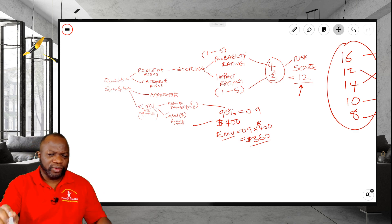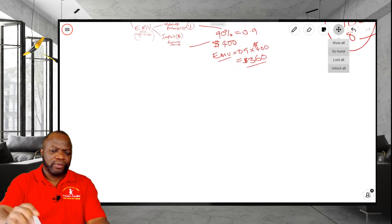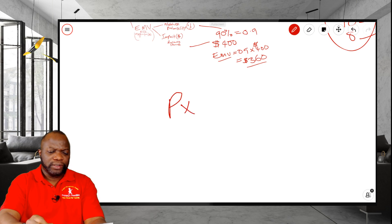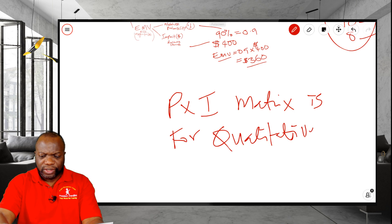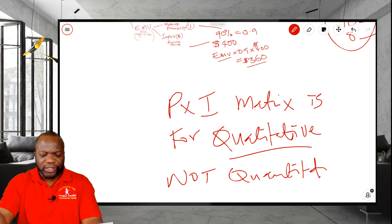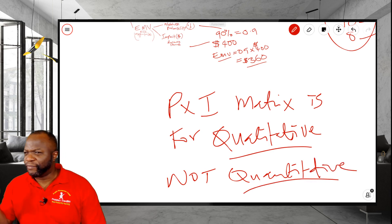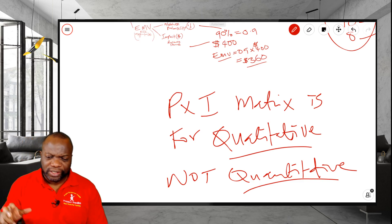Contrary to what a lot of people think, let me just spell it out. The P times I matrix is for qualitative, qualitative risk analysis, not quantitative. I know there's a misconception, but until you begin to read the details, you will not get the facts. Read the details and it will become very clear.